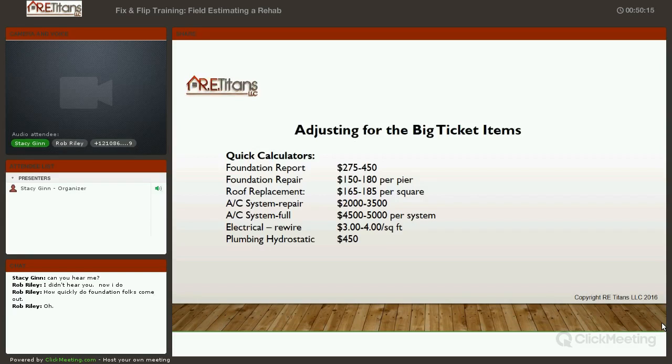The other is when we talk about permitted areas, what we started seeing, I think, last year in 2015, is that more and more they were leaning towards replacing that plumbing. So what does that get us into? Actually, I'm going lowest to highest. Just for some basics, if you've got a house, and a lot of times this falls in a rental, but even the flips, if you need to replace a water heater, depending on whether it's gas or electric, you're looking at about $1,000 to $1,250.